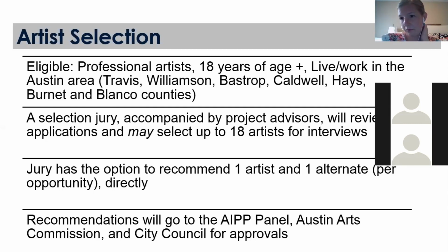I could add to that. We always work with our artists when they're working out their budget. So out of this budget of $100,000, if you want to do a little back of the envelope paperwork, you can take away 20% for your design fee and then a 5% contingency. And then you can take away all of your hard costs like your studio overhead, your insurance. And then with that residual amount, you can figure out materials, installation, transportation, fabrication, and sort of work backwards from that $100,000 mark. And that will help you budget your total project, including your time. Yeah, that's a great example. Thank you.